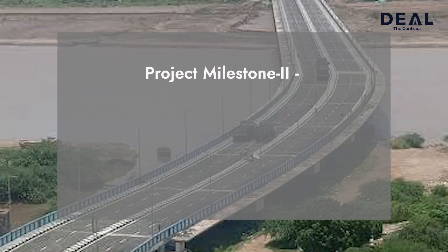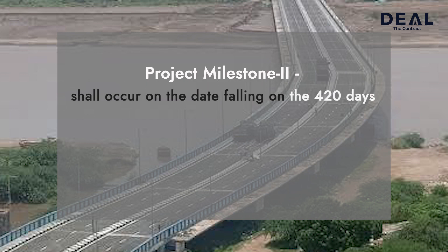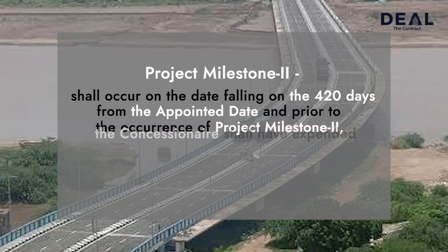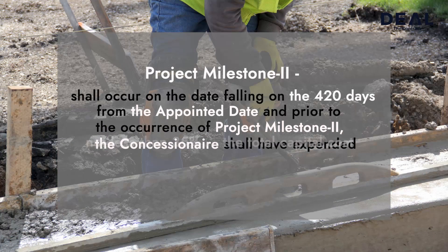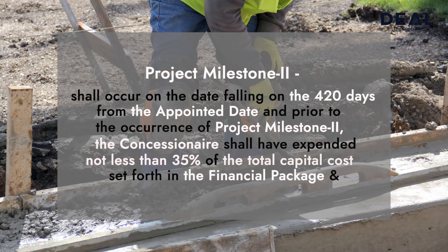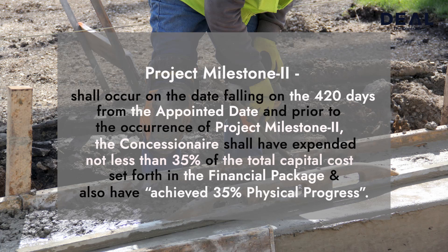Project Milestone 2 shall occur on the date falling on the 420th day from the appointed date. Prior to the occurrence of Project Milestone 2, the concessionaire shall have expended not less than 35% of the total capital cost set forth in the financial package and also have achieved 35% of physical progress.